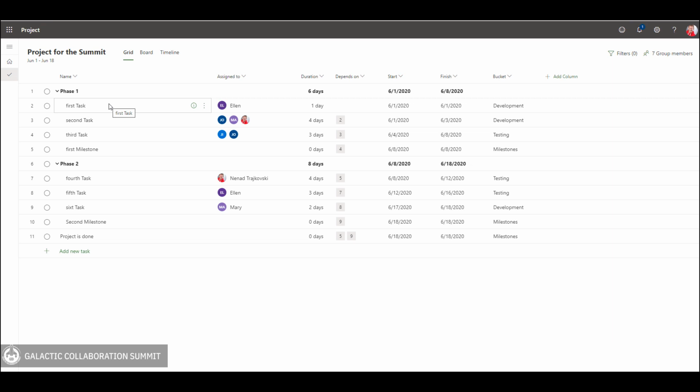First of all, I can track my project, my tasks, in grid view. I can simply go here, add column, put percentage of complete, and I can here put, let's say, 50%. If I put 50%, in the graphic indicator I will see that this task is 50% finished, and the 4 hours are left, and the total percentage of completeness of my summary task is 6%.